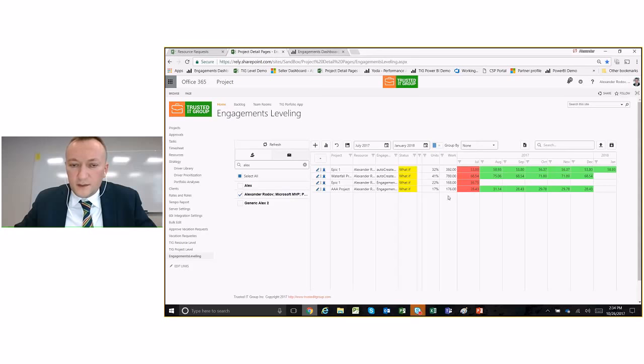Here we have the over-allocation. I have the initial units very low, so that's why I could overlap a lot of these activities at the same time. But if I bring some of these up to 100%, this will create more over-allocations. So in this case, someone else will either reduce the units, which would reduce the level of engagement of this person in this engagement.